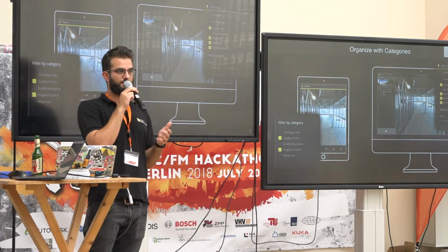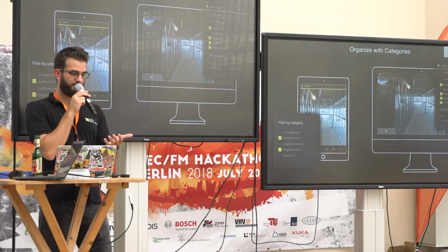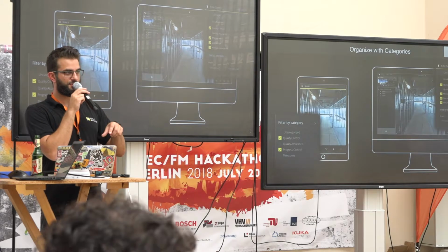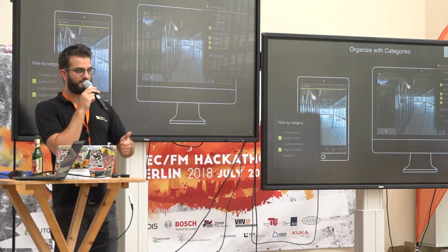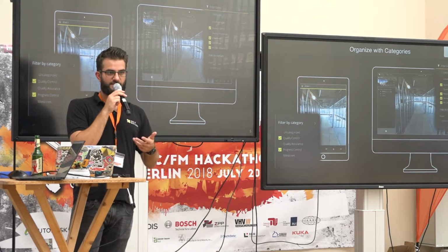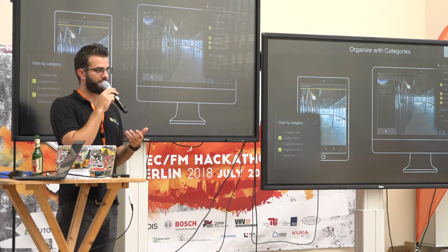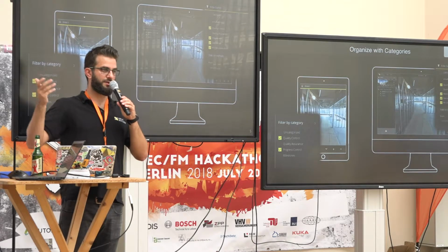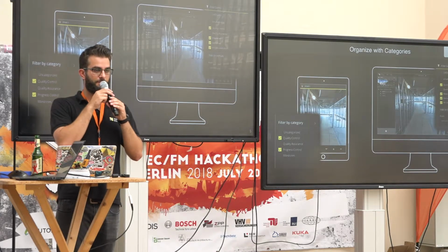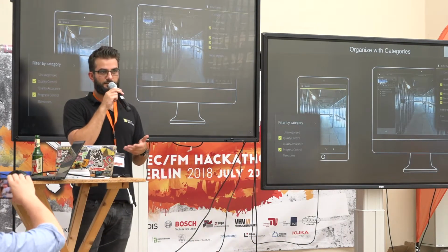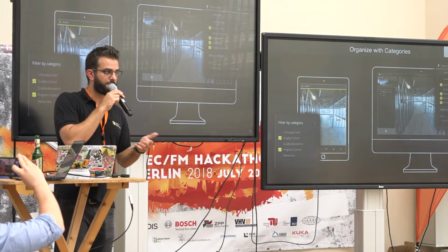We enable you to categorize images with categories, which is basically, if you go on sites using the Dropbox app, you can say, okay, today I want to capture, for example, the drywall construction as a milestone, and every single image you take there will be categorized as such. As soon as you get back to the office and upload all your data again, anyone across the country can check your data and see exactly what you did and whether it's what you should be doing or not.